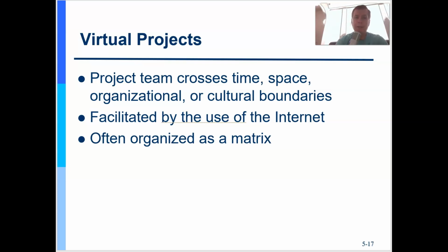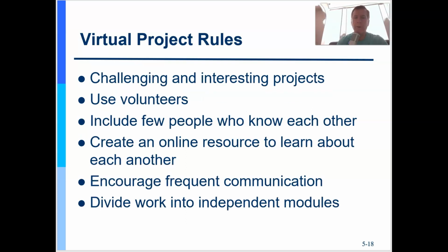So there are ways to make virtual projects work for you. And here are some examples of rules of the road. The key would be frequent communication. In fact, that makes me think the third thing that I did with virtual teams on virtual projects is I would have everybody, instead of using email, use a chat, because a chat meant that as soon as somebody said something, I didn't have to wait for your email.